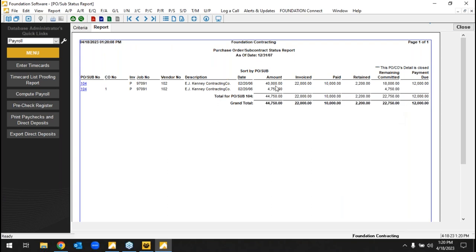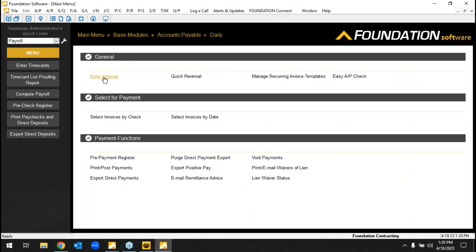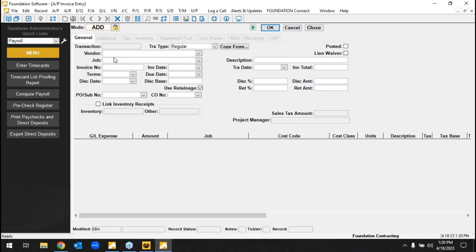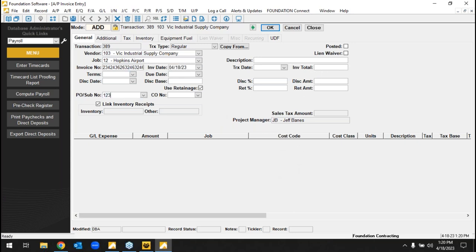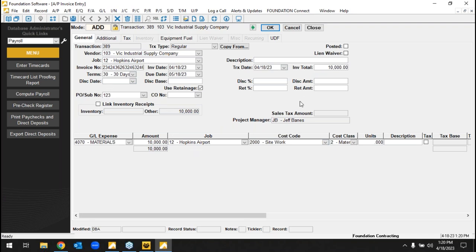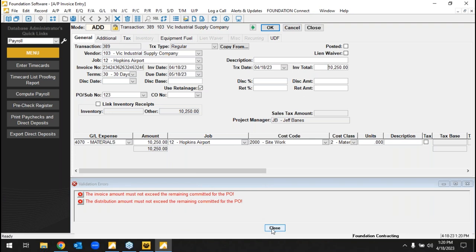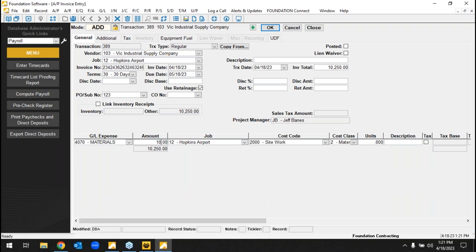In the subcontract view I can see the subcontractor, the commitment amount, what they've billed us, and what's remaining. In AP, entering an invoice is straightforward — whether it's a cell phone bill, material, or subcontract, you pick the vendor, and if there's a job, you pick the job. Linking the purchase order pulls over the remaining committed cost automatically. If that vendor overbills me, the system will stop me — or at least warn me, depending on the restriction level set — so I can research whether a change order is needed.